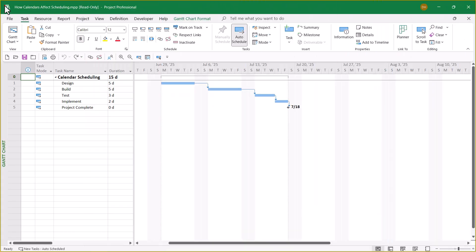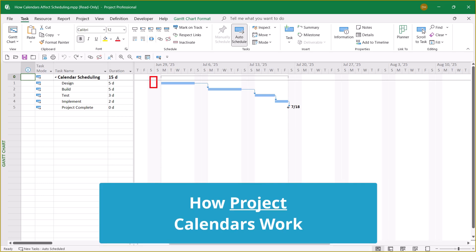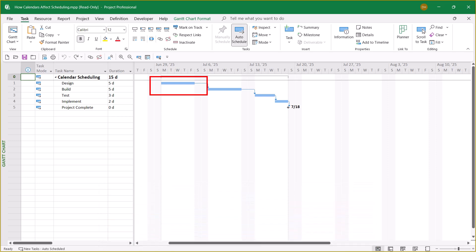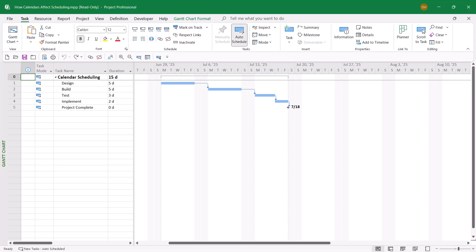First, I want to talk about the Project Calendar. Notice that the Design task is currently scheduled during the week of June 29th, Monday through Friday. However, there's a problem with this task schedule because Friday is the U.S. holiday called Independence Day, which occurs on the 4th of July.